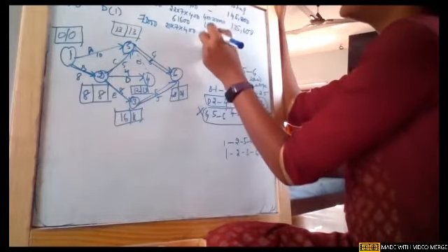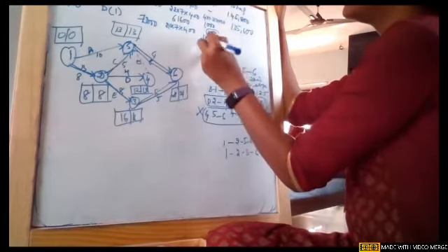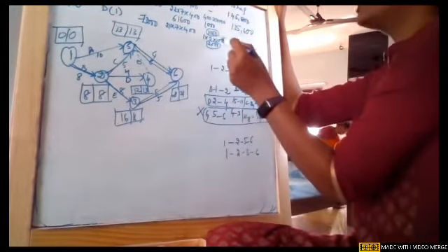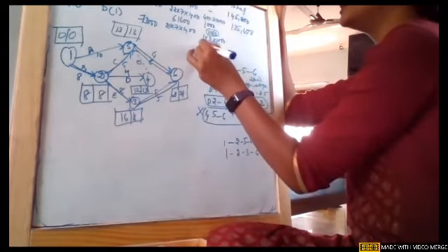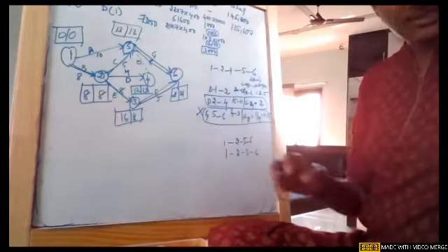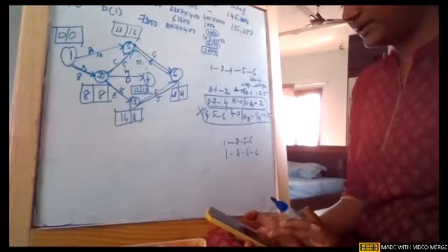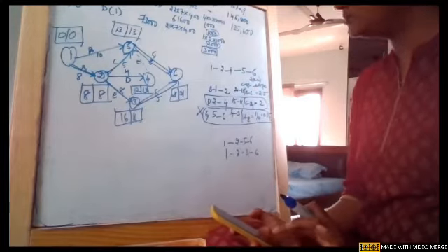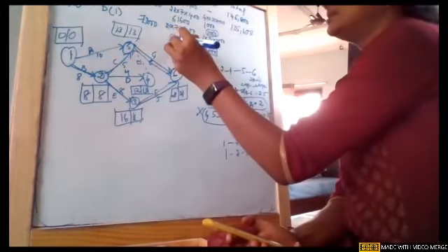So the new value is 2000. So 1000 plus 2000, the cost here is 3000. We are supposed to take 3000, girls. And so now if you see, 21 into 7 into 400, did anyone find out? It is giving us 58,800.